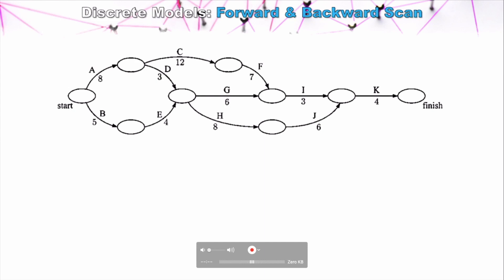Now that we've looked at what a precedence network is, what it shows, and how to create one, let's look at a method we can use as projects grow in complexity to identify where our critical path actually is within a really complex network. This technique works even when networks have hundreds or thousands of nodes. We're going to use a relatively simple project to demonstrate the technique. A critical path is the series of tasks where delaying any one of them would delay the entire project. We could try going through every possible pathway by trial and error, but there is a method called the forward and backward scan.